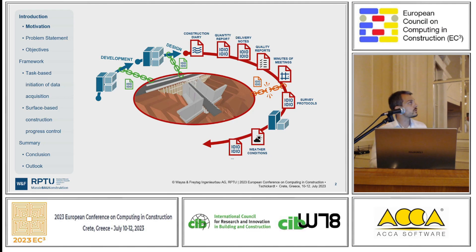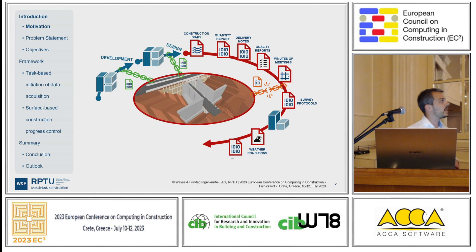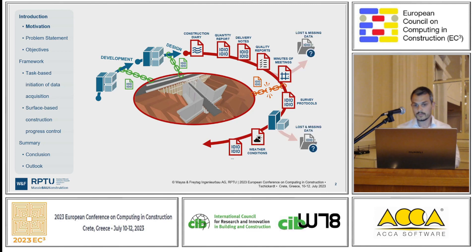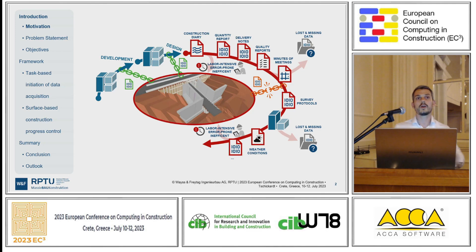It's quite hard to integrate information from a construction site — like the construction diary, any reports, minutes of meeting, or weather condition survey protocols. These existing documents are difficult to integrate, for example to link data. It's quite complicated to implement. We even have lost and missing data. This ends up in labor-intensive and error-prone manual data integration into the BIM model. And of course, if I tell my colleague they have to do that all manually, they will tell me, please go home, Thomas.